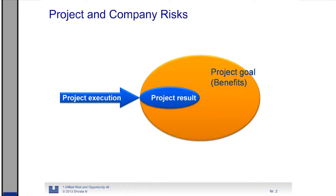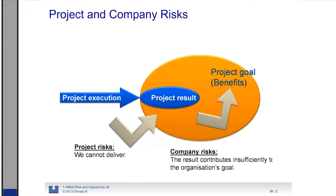As a project manager, normally you talk about the so-called project risks, and these are risks that could jeopardize the delivery of the project result. When you discuss these risks with your project sponsor, you need to realize that the project sponsor is thinking about company risks. For him, it's a risk when the project results contribute insufficiently to the organization's goal. A lot of the misunderstandings between project managers and project sponsors is exactly on this frame of mind. So whenever you discuss something with your project sponsor, always try to translate the project risk to the company risks. This will help your project sponsor enormously in making the right decisions for your project.